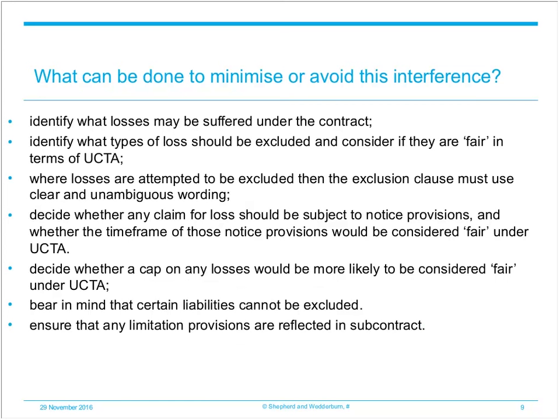After that, you should decide whether a cap on any losses would be more likely to be considered fair under UCTA. And finally, one should bear in mind that certain liabilities simply cannot be excluded, usually liability for fraud, negligently caused death, or personal injury. If these are excluded, any such clause excluding those aspects is likely to be void.